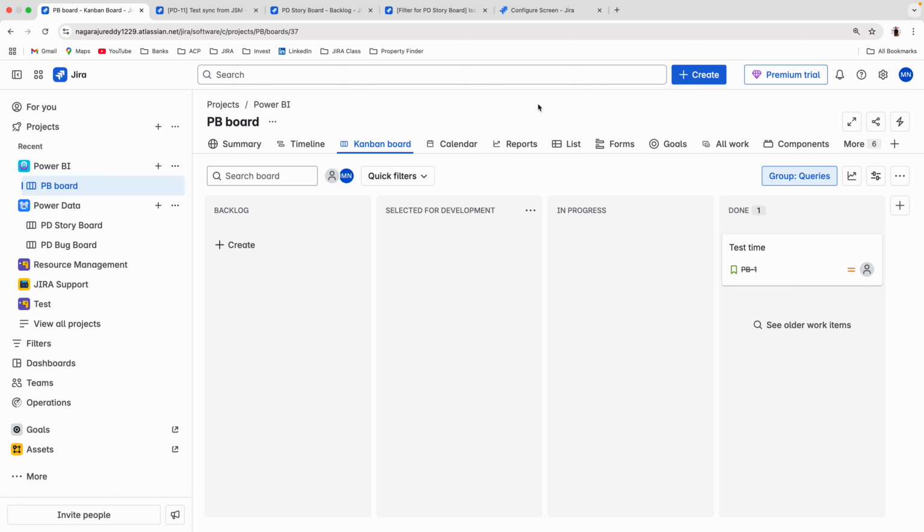The Scrum board works based on the planning's time frame. The Kanban board works without planning. Planned, unplanned, only this is the major difference. For any development activities that you want to develop within a time frame, you need to go to Scrum. If there is no time limit or time frame, it will go to Kanban.